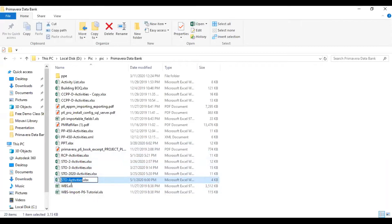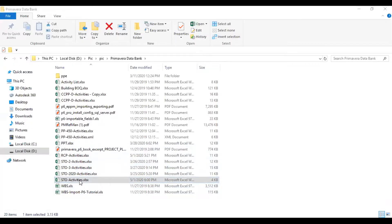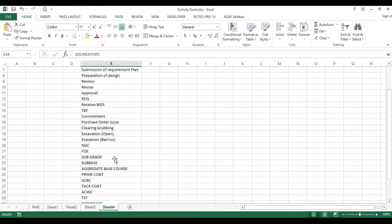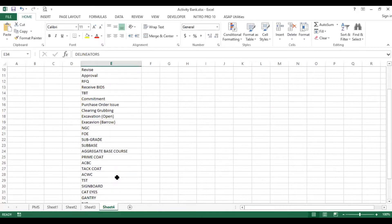This is the Primavera 6 exported file. It has two sheets. You don't have to do anything in this area — just go to the Task sheet and don't change anything here, as this is Primavera 6 programming format. Just expand the column width as required. That single activity you generated in your Primavera 6 project file is visible here.